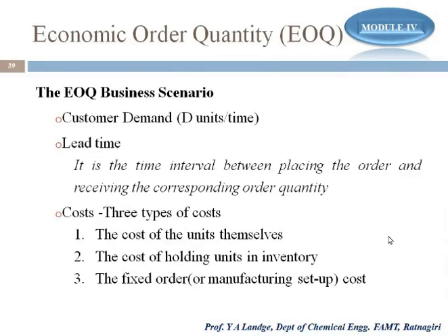Okay, and when I am placing my raw material order, he will supply it after 7 days. It means a 7 day buffer is required for me, I have to store 7 days of raw material in my storage. Why? Because he supplies my order only after 7 days. It means he requires 1 week for supplying it. So that is also very important for me to look out for.